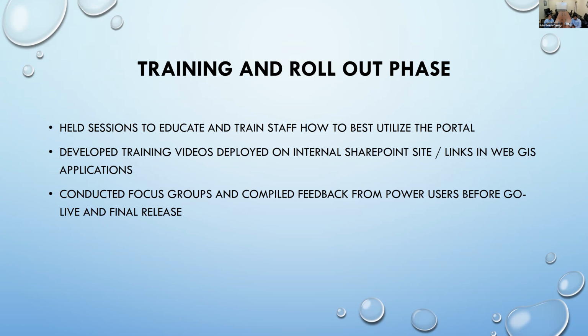And you can see the editor application on the bottom right there. So with that, speaking on proposed water valves, that all comes in together with layering our criticality data. We have criticality outputs for consequence of failure and likelihood of failure for our mains, created for our sewer and water side. So we have water-specific and sewer-specific improvement applications that culminate all the criticality data into its own map. On top of our customer service database, we have a complaint call table that's geocoded that represents where break history in the past 20 years exists, and where we can prioritize work and look at where our most critical infrastructure is on the utility side to help determine where to best allocate dollars for future projects.